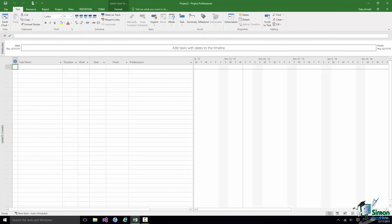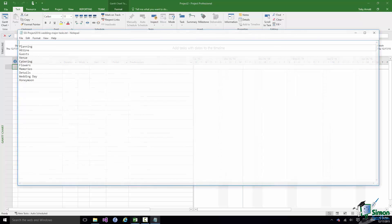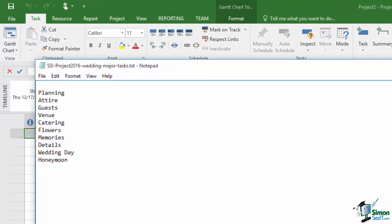First of all I've made a list of the main aspects of this wedding plan — it's actually in the course file folder if you want a copy. The headings are: Planning, Attire (basically the clothes people are going to wear, but probably a little broader than that), Guests, Venue, Catering, Flowers, Memories, Details, The Wedding Day itself, and The Honeymoon. Those are going to be my main headings, and the first thing I'm going to do is start adding each of those to my project plan.